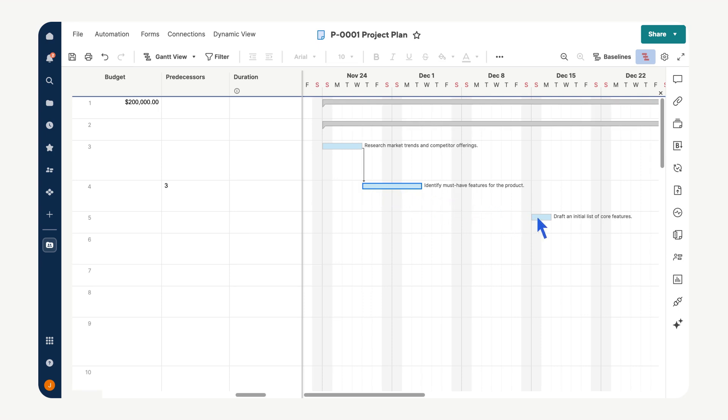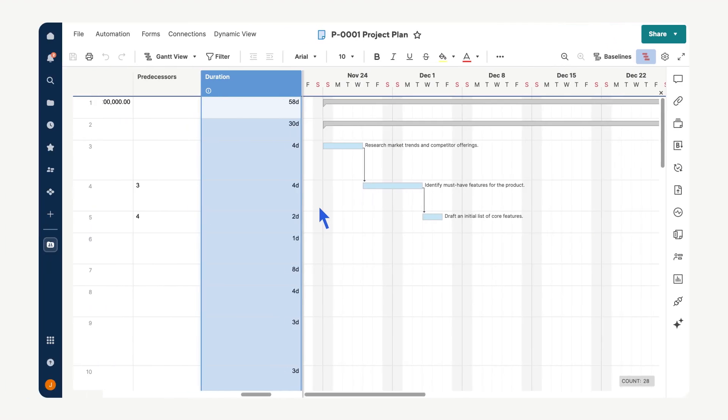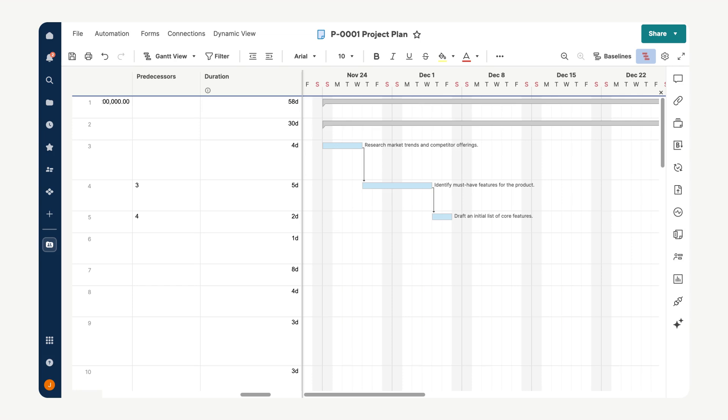The duration column determines how long a task will take to complete and directly impacts dependent tasks. For example, if the duration of the task in row 3 increases from four days to five days, the start date of the dependent task in row 4 will automatically adjust, pushing it back by one day.